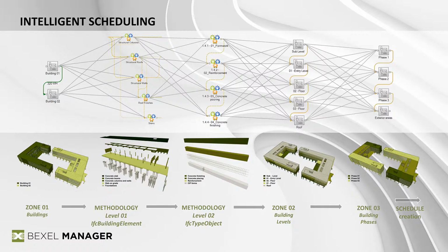In case your model doesn't have all methodology items in all zones, the system will smartly find only existing work items in that zone and then relink them with the next methodology item in that zone, just by reading available information from the BIM project. So for making methodology items, it was very important to explain and understand how to create a cost breakdown structure, which we did yesterday.